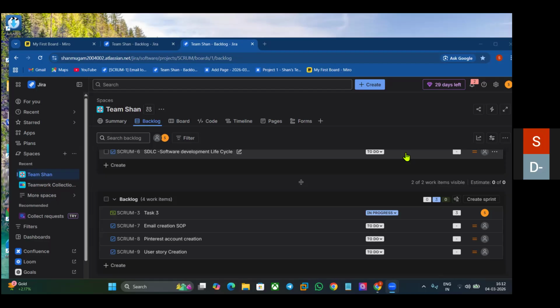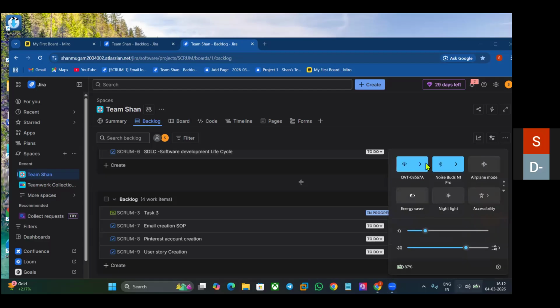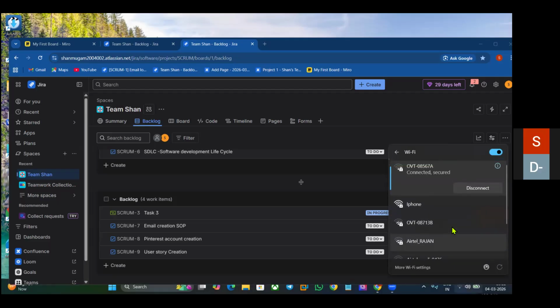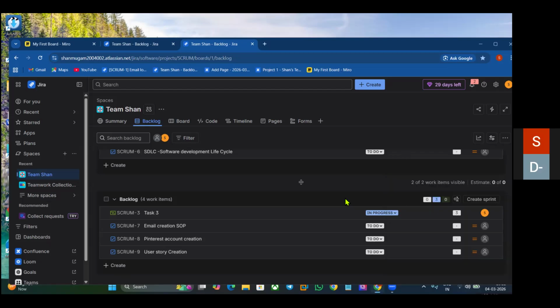So what you do with the completed user stories, let's say the credit card project we were talking about, we identified 10 user stories, but you have only completed 2 so far, right? So you take those 2 user stories and go to the PBR, Product Backlog Refinement meeting, and you will be the one to drive the meeting. You tell them, hey guys, welcome to PBR. Today I have 2 user stories to share with you.